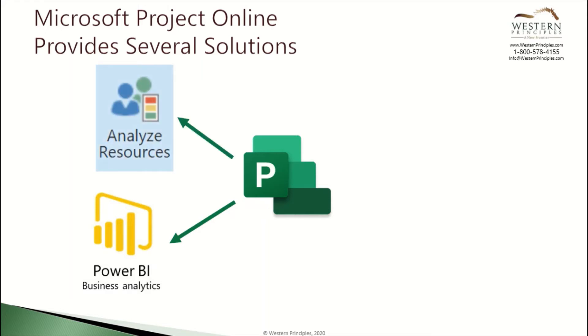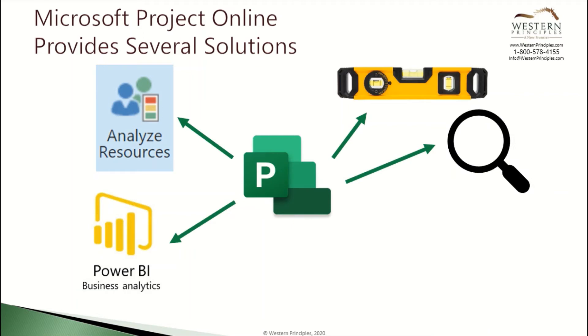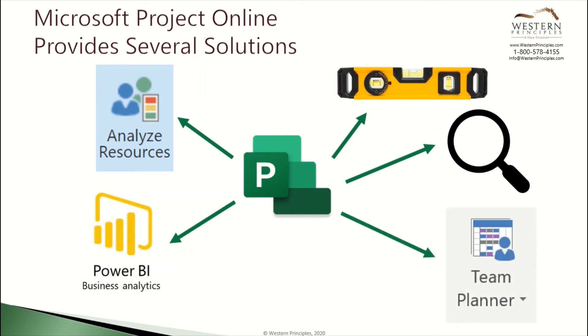You can use the resource analysis as part of the portfolio management capabilities in Microsoft Project Online to do capacity planning several months out. You can use leveling to move activities around automatically, use the resource query tool to match and replace resources, or you can use the Team Planner, which is what we're focusing on today.